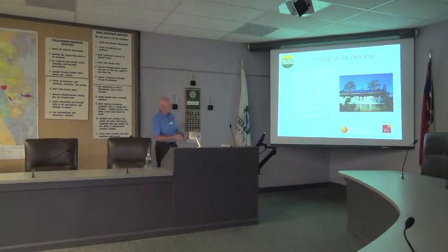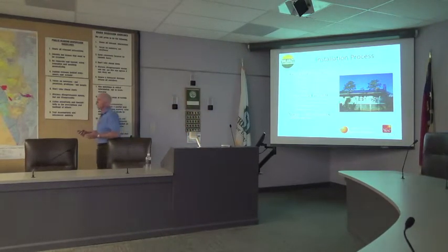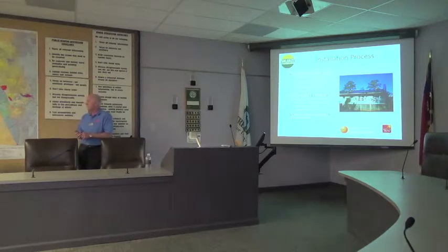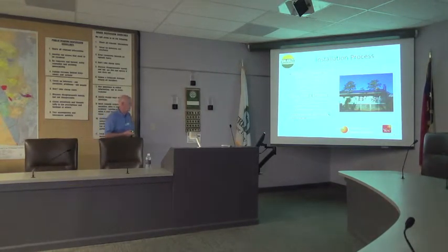So the installation process, we've talked about some of this already, is you sign up, one of the two companies will call you, review with you over the phone, most likely with Google Earth or Maps or Bing up, and we're looking at your home, making sure that it is your home for one thing, making sure that you're a good solar candidate, and then we'll set an appointment with you to come out and do that site analysis. And that site analysis involves all of these things right here.